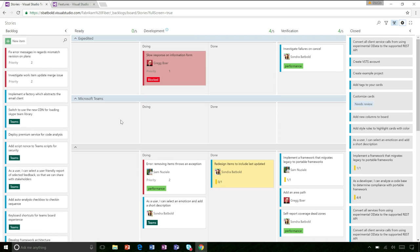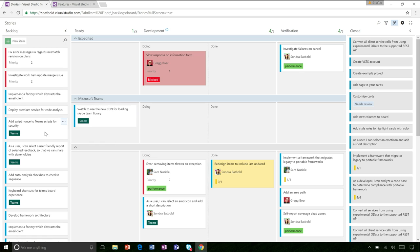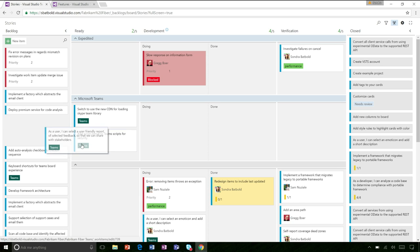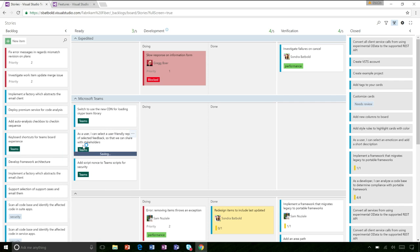The reason I added the ready column is so that instead of having this giant backlog where team members have to figure out which items belong to which value stream, I can start dragging items with the Teams tag and prioritizing them in the ready column so that team members can pick them up as prioritized. So this is almost like a lane for stuff we've committed to delivering, versus the whole backlog. Yes, and it's committed by value stream or by feature.